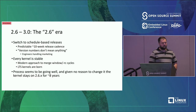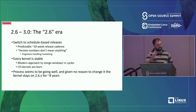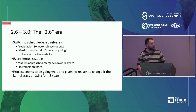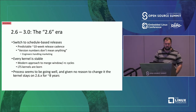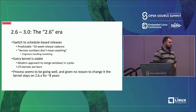Every release is a merge window that takes two weeks, followed by a stabilization period of weekly release candidates for about another seven or eight weeks. At the end, the kernel release is stable and good enough for customers to run. For customers who want more stability, this is where the concept of LTS trees was born, where LTS versioning was the fourth number at the end.